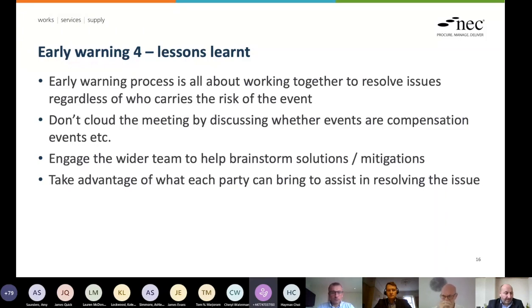Okay, I think I'll just make a point as well. Obviously, in terms of the meeting, as the project manager, I'm chairing the meeting, though that doesn't have to be the case. There is nothing stopping the contractor chairing the meeting or somebody else chairing the meeting, as long as obviously the project manager is updating the early warning register as required, is recording the actions. There's no need for a single person to chair it or the same person to chair it.